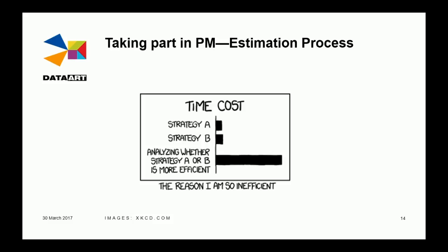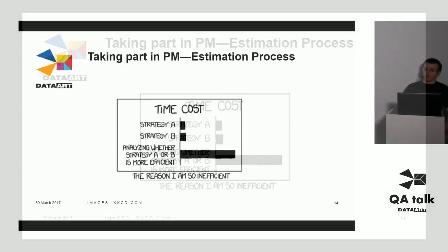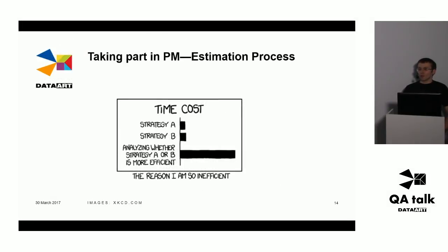Change requests, I have already mentioned them as part of business analysis, but you can also test change requests from a project and process perspective. From the process perspective, you need to check that the change request is correctly described, that everyone who needs to be informed is informed, that the change request is included in the process flow, that everything is stored in the right way, documented, etc.